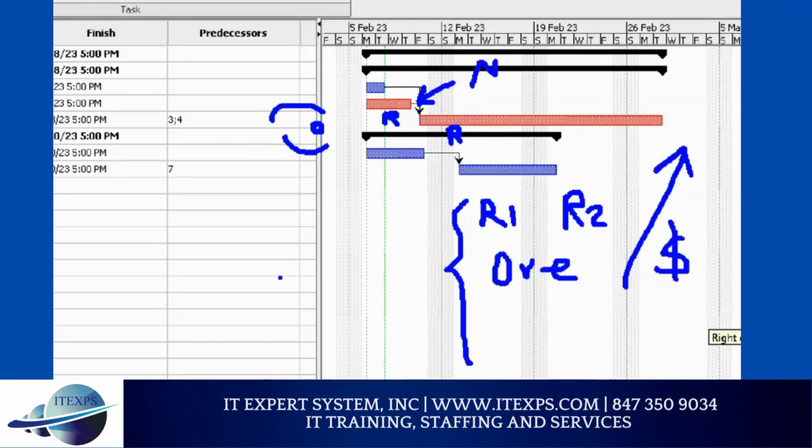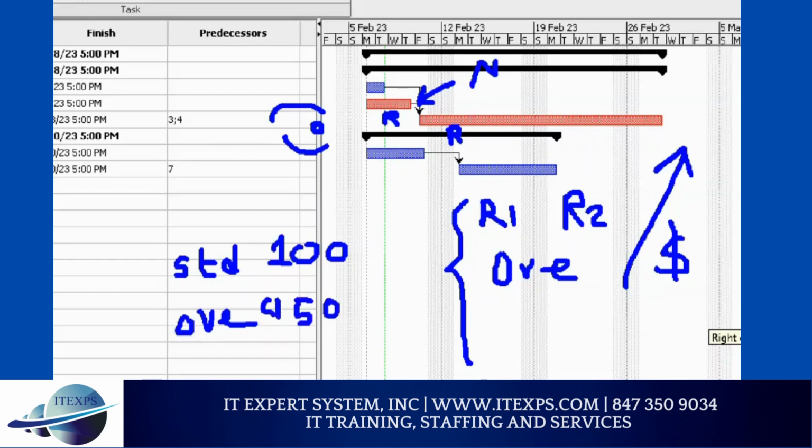In America, the rule is if you work standard hours, please pay attention, you make $100. But if you work overtime, you make $150. So it will burn your budget much faster because they give you 1.5 times, which is $150. Make sense? What else? What other options do we have? People on the phone, you should be creative. Come on, it's okay to speak up. Remember, the more you speak, the more you will remember. What else can you do?